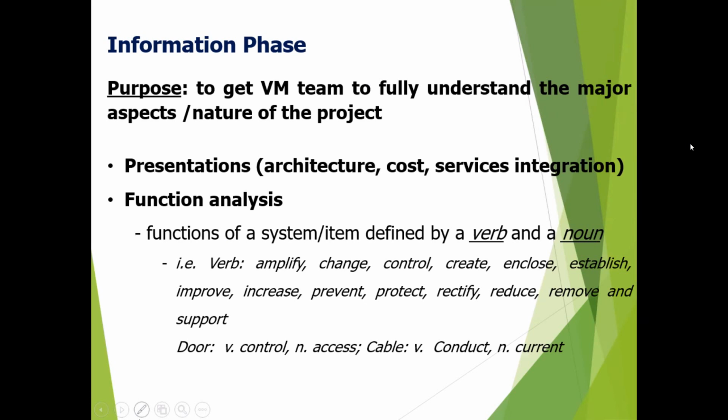And cable. So we have cables in a project, and that is basically to conduct current. So conduct is a verb and current is a noun. So every function is analyzed and identified like this. Why is this there? Whether this can be done by anything else. So you can ask those two questions: why, and how else can this be done? Is there any other alternative way?